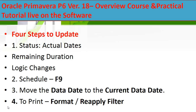The steps to update your schedule: you're going to enter the actual dates and update the remaining durations — many people in the market don't update the remaining duration, but it is very important. You also have to check the logic for any logic changes. After that you can press F9 to schedule and get the early dates and the CPM end date. You have to move the data date to the correct current date, and then you can print your report for the project manager to review.